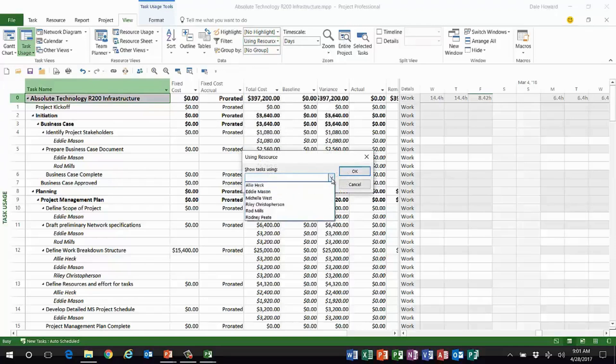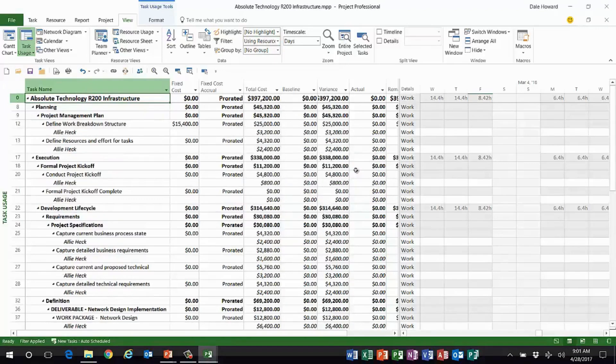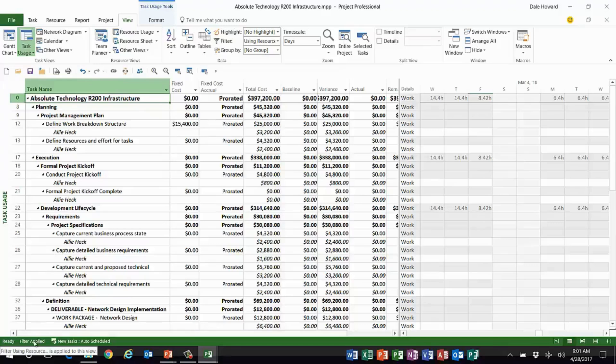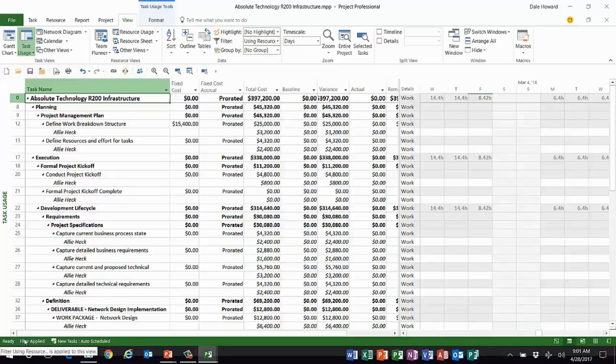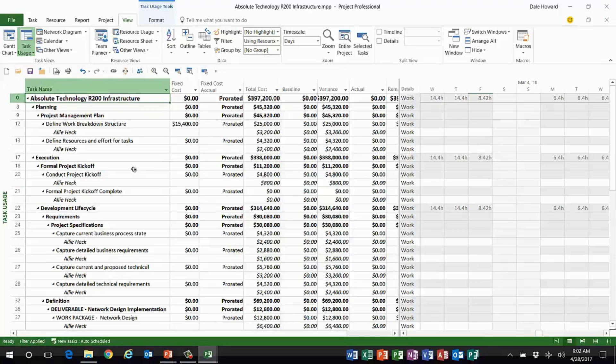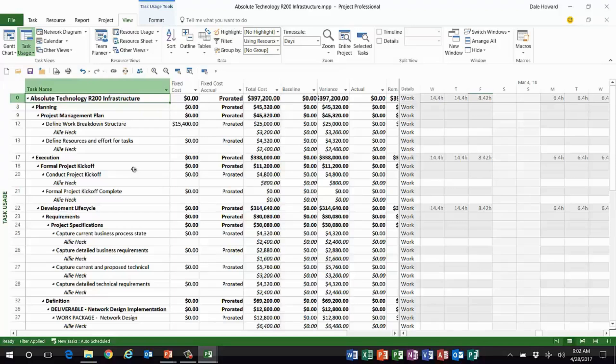Now let me show you another one. If I apply a regular filter, a standard filter, for example using resource, and I want to see all the tasks assigned to Ali Heck, bingo, there's everything Ali's assigned to. But in the bottom, in the status bar, it now says filter applied. Filter using resource is applied to this view.